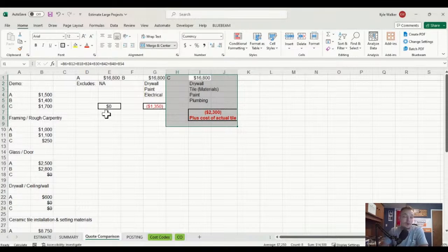Again, if they don't give a scope of work, that's a red flag for me. That means that if there's a problem down the line, they're going to tell you that they may have a change order for something they actually included, but they just figured wrong. If it's not clearly described in the scope of work, the project scope agreement, then it's either excluded or you have no idea. And if you don't have any idea, that means you're probably going to be taken advantage of.